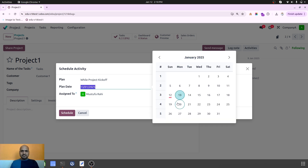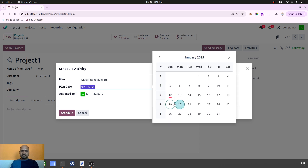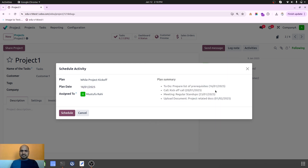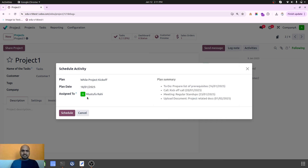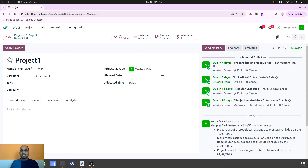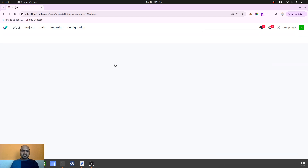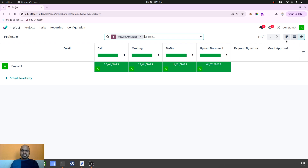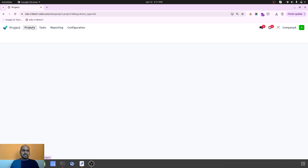So if I want to start my project on the 20th, then by the 18th that documentation list has to be completed, because that's what I mentioned in the plan. If I choose my date to be the 18th, then the 16th and 20th will be the dates where we need to plan the activities. I can assign a user and that user will get the entire planning, and in the project they can see four future activities have been given.